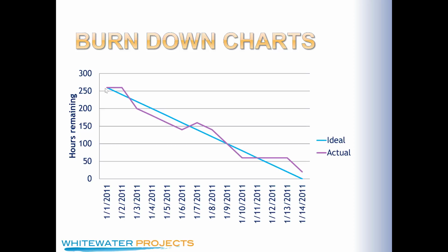So do not just take, so say your story estimate was 8 hours of work, right? So that's probably 2 days' worth of work. Nobody works an 8-hour day. You get up and you go pee and you talk to people and there's interruptions and nobody works 8 hours.